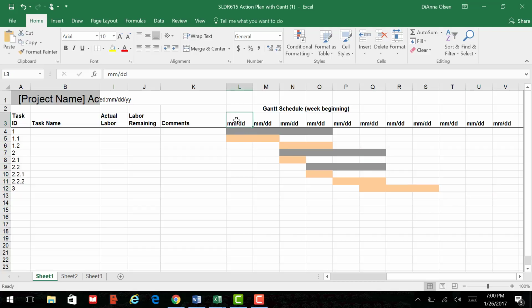We're going to start on March 1st, but we're going to be done June 1 by the time we get every step completed. I will often break these into phases, meaning a phase 1, a phase 2, and a phase 3, so that we can close out one phase and begin the next. That doesn't necessarily translate to manufacturing, but it works well in the service industry when you're performing a service.